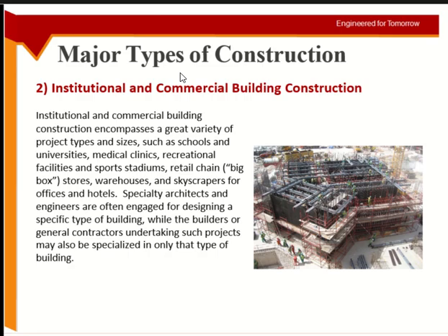Parking facilities. Okay, and with the parking you need what? Parking from where? People will come from where? From the roads, right? You need the proper connection as well. You need to make sure that your parking is not disturbing the traffic. So now you see there are extra approvals here. Very few housing projects need an entire traffic study or environmental study, but many of these projects need it. Otherwise the project will not be approved.